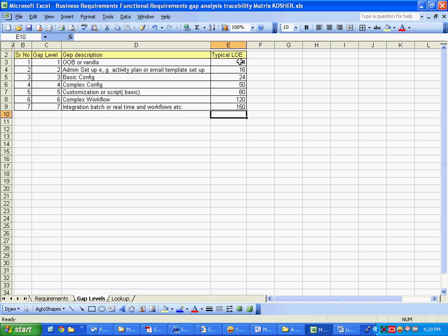Okay, so you learned this also, the rules of thumb. If you have to add a new field or something in an applet, basic config, so 3 days. If you have to make a full applet or something, make a complex join, make a complex write or something, any kind of complex configuration, 5 days, 50 hours. Any kind of full applet takes time to build. He has to take physical time, and he has to unit test it also. He has to make sure it is working properly and all the validation rules are set up properly.